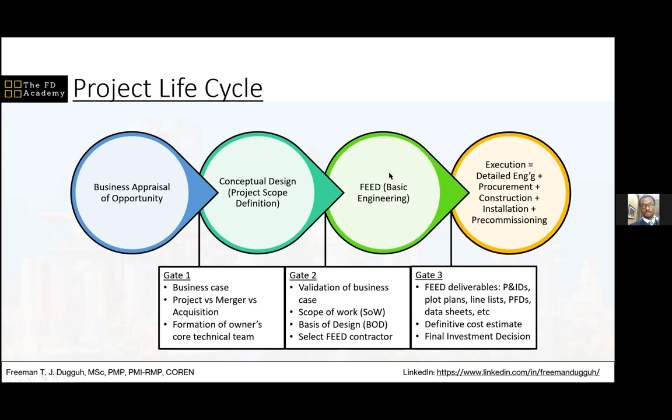Mind you, the engineering contractor might be separate, and that engineering contractor will then give deliverables to the EPC contractor, that's the construction contractor, who will then go ahead and complete some engineering, handle procurement, handle construction, installation, and pre-commissioning. I did not say commissioning because, as I understand it, in the standard way of running these projects, pre-commissioning is